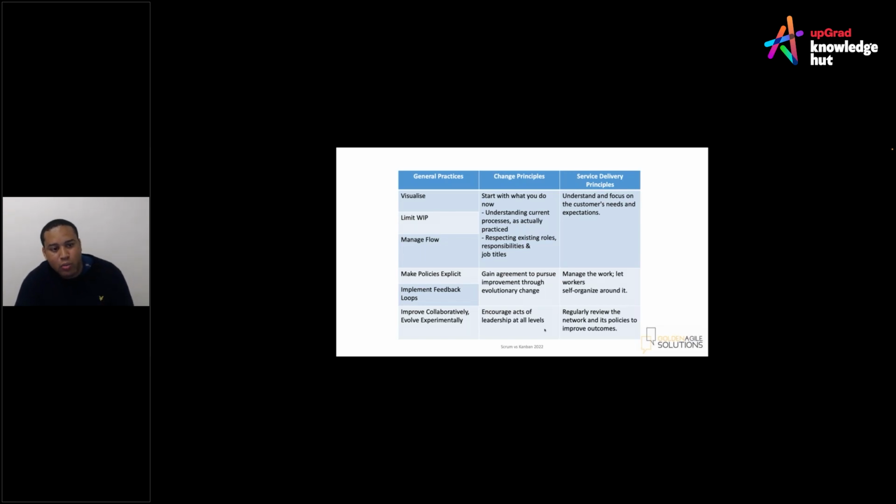You can also see, well, this ticket has a defect on it. We might put a red mark on this ticket here. And the whole team are able to see, well, we might have a blocker here because there's a defect and we cannot move forward until we can turn that around. So it's all about visualization, transparency. Everyone can see what you're doing at any given time. These are the benefits of our Kanban board.